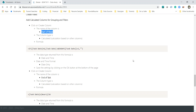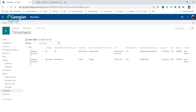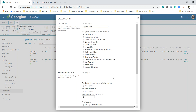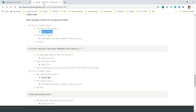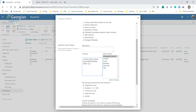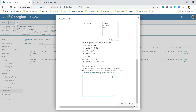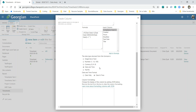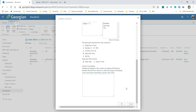Let's get started. We're going to start off with adding a 'Start of Week' column. We can just go in here and click on 'Create Column.' You'll see this is a slightly different view than going through the list settings, and it's going to be a calculated column. We're going to go over here and grab the formula and paste it into the formula field. Feel free to dissect what that formula does if you weren't familiar from the last video. We're going to set the return type as date and time — date only — because we only need just the date information.